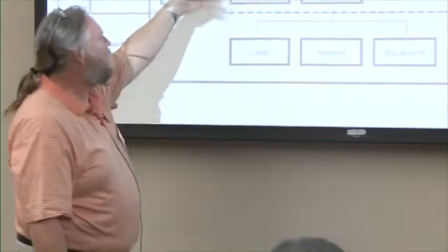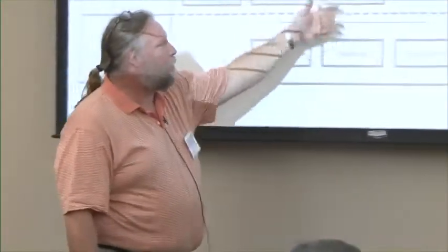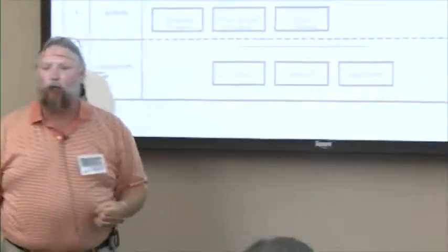This is not part of a schedule, but it's a work tool that we use. It's called a work breakdown structure. It basically breaks down the project so we can look at it. Total project, we've got subheadings, and we've assigned different tasks: administration. We look at the construction, we have different tasks. We look at the footings, we have this. We look at the placement of the footings, we have what we need involved in it.